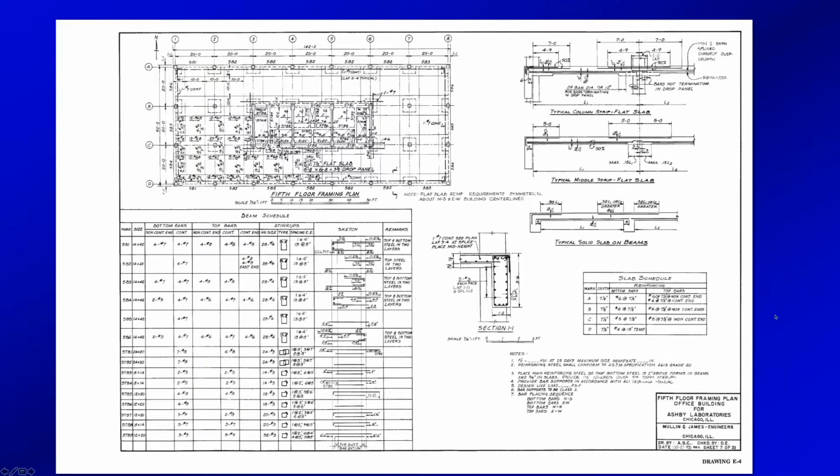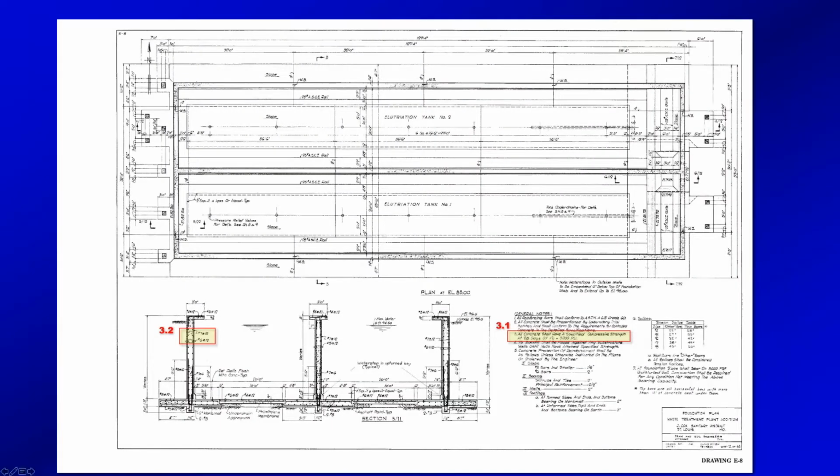All right, so the next set was on E8. Okay, I didn't hear from Luke. I'll have to ask that question. There's a question on this too, and it's something to do with the spacing up at the top. On drawing E8. Okay. Well, I got a couple questions here that were given to me. What is the specified strength of the concrete? That should be pretty easy. If it's not written out, it's typically right there. All concrete shall be 3,000, 28 days.